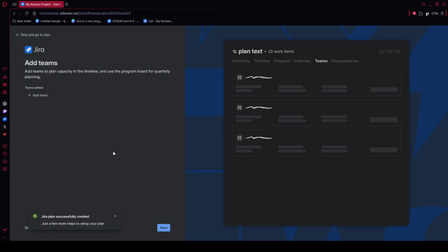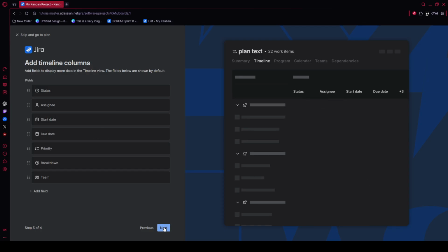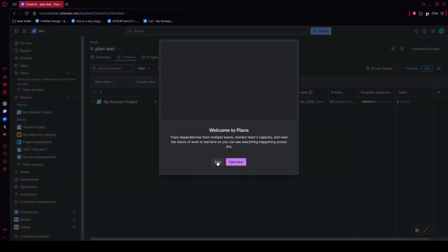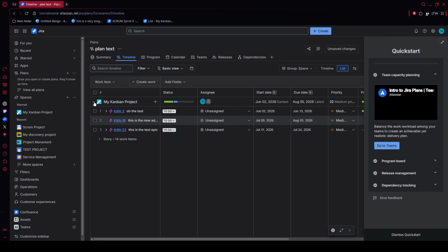Now switch to the team's view above the timeline. This is where the plan becomes especially useful. You'll see workload allocation displayed visually across the schedule. When work stays within the team's defined capacity, the indicators remain balanced. If someone is double booked or a team is carrying too much work at once, Jira highlights that with warning colors so you can spot the issue immediately.